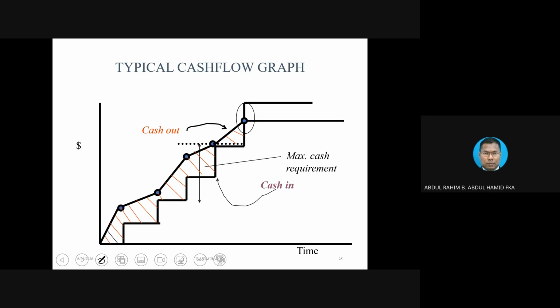It is like you coming to university, you are getting payment from PTPTN, isn't it, initially? That is what we call advance payment, to help you out so that you can purchase things and register, etc. When advance payment is there in a government project, maybe the government is going to give you 10 or 15% of a certain amount. By right it should be 10% of the contract amount, but it is subject to a maximum amount. It is not simply the total amount anyway. So advance payment is going to be paid at the beginning of the project. Let's say this is AP, advance payment.